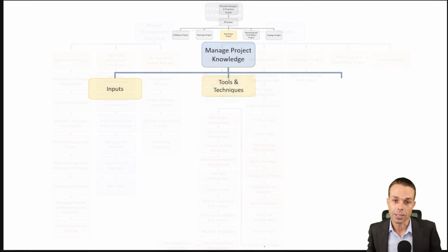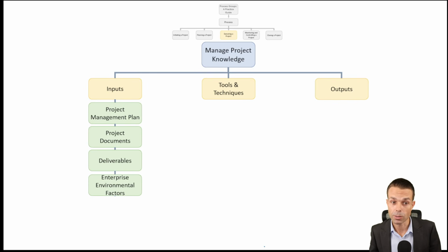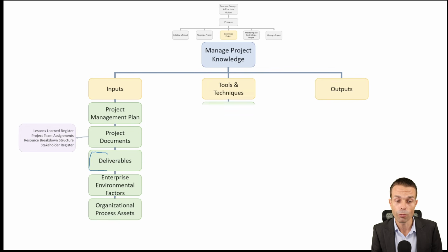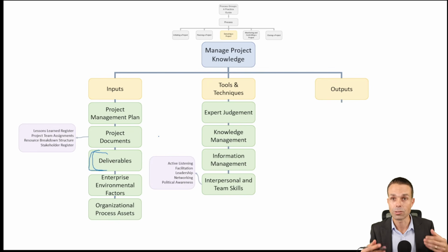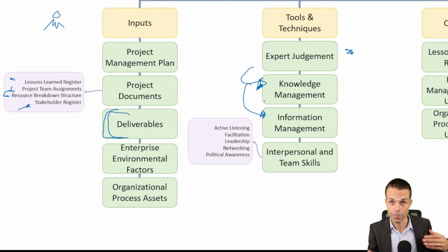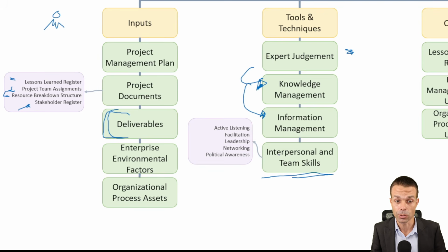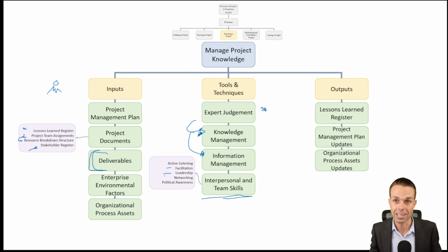As we're executing the project, we're going to manage project knowledge. So the project management plan, project documents, and the deliverables themselves will all form an input into managing our project knowledge, because as we learn things, we need to make sure that is captured. Tools and techniques, expert judgment as always. Knowledge management, so how are we managing the knowledge on our project? Information management, how are we managing information? Where are we capturing all of those things? And interpersonal and team skills, so facilitation and leadership to gather and extract all of those lessons.